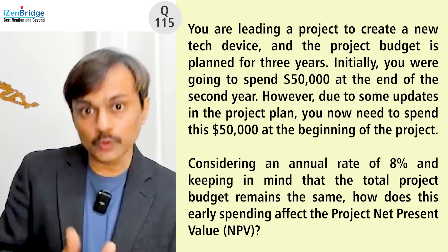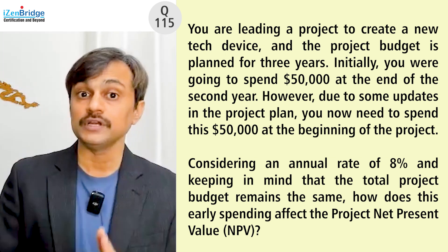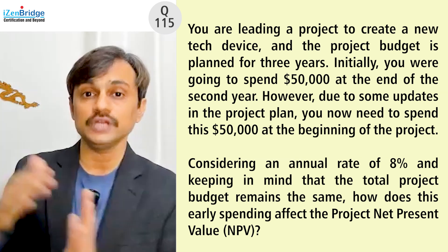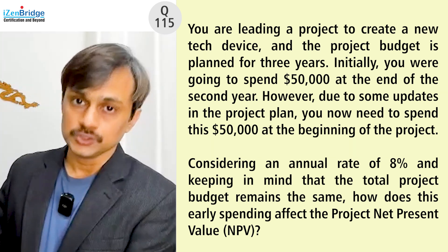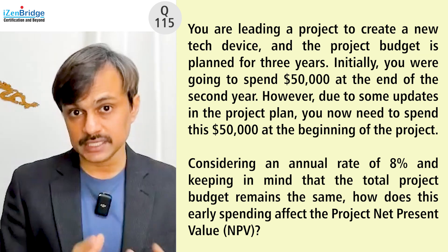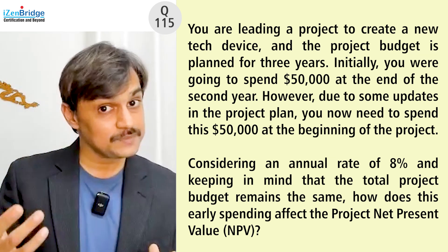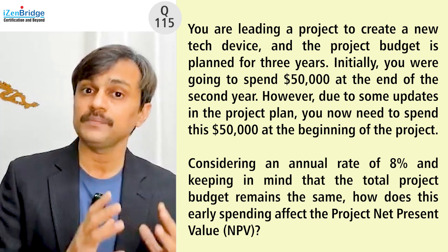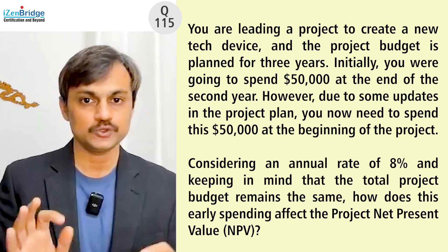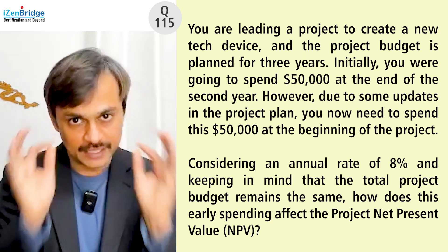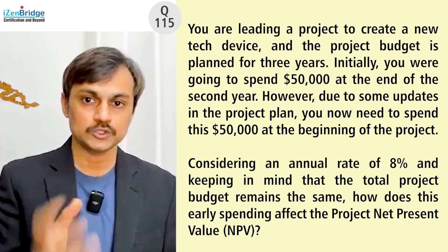Expenses happening early will reduce your profitability when you consider the time value of money. Your outgoing in present value terms will be more if compared to this money going out after two years. So it decreases — it increases your expenses and decreases your profitability in the form of net present value. So that gives us our answer.